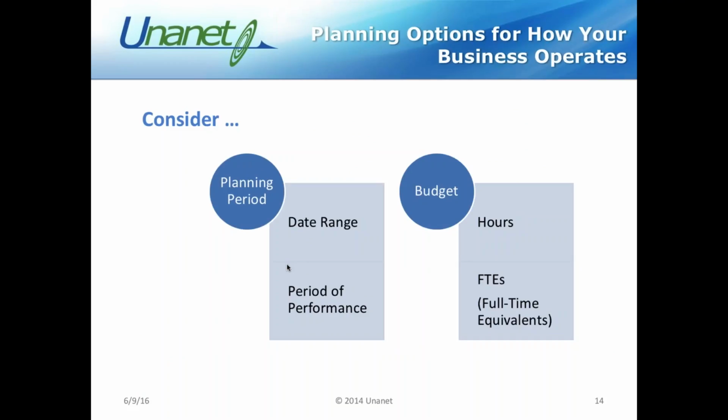A best practice that Unanet would recommend is to plan your technical resources by the pay period, so that every pay period when you get those timesheets in, you can look to see what that plan looks like compared to the actuals, and you can check in every pay period, whether it's weekly or semi-monthly, etc. The other idea is for maybe your PMs that have to work on the project the whole way of the period of performance.